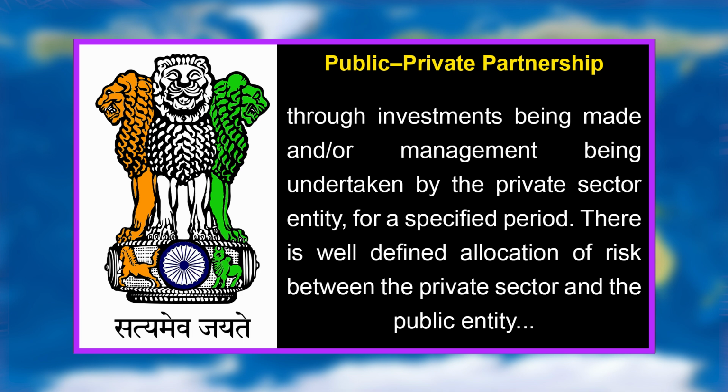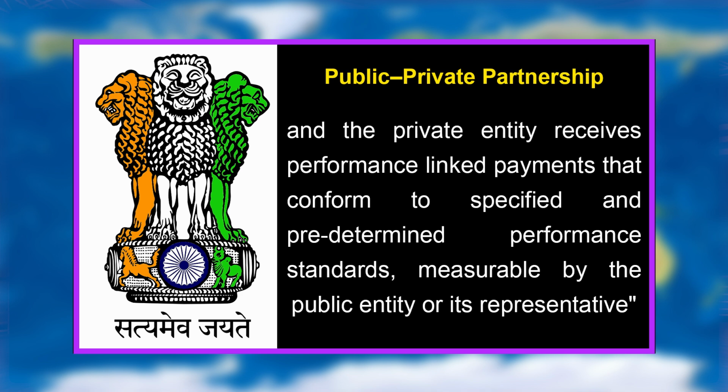There is well-defined allocation of risk between the private sector and the public entity, and the private entity receives performance-linked payments that conform to specified and predetermined performance standards, measurable by the public entity or its representative.